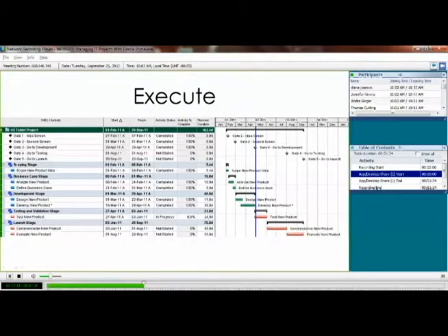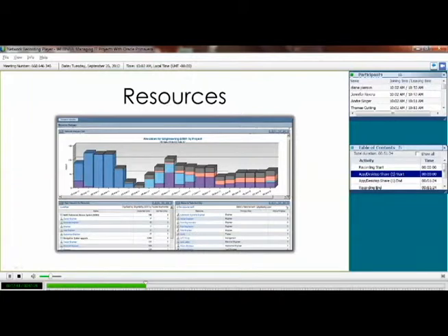They come in here, they have each activity, and then they assign a resource, meaning a person, a programmer, an IT manager, for each task. And then they have resource management, not only for this specific project, but for all the projects across their enterprise. So now there's an enterprise IT view.